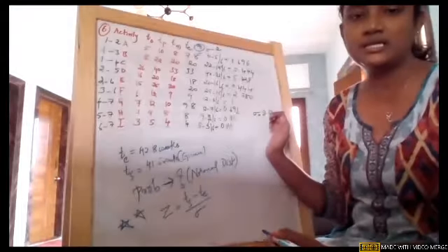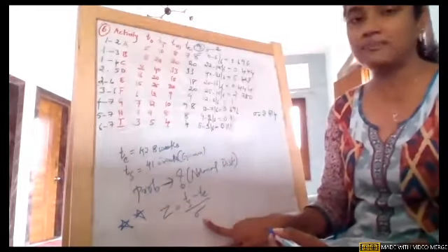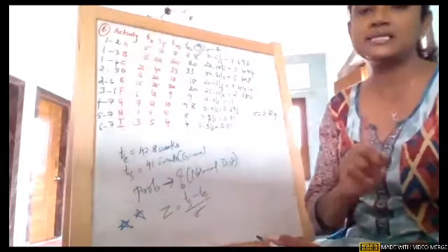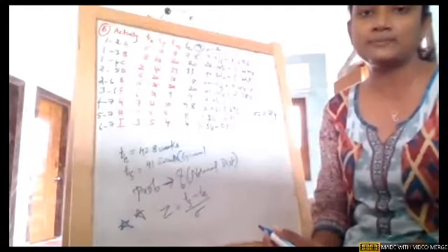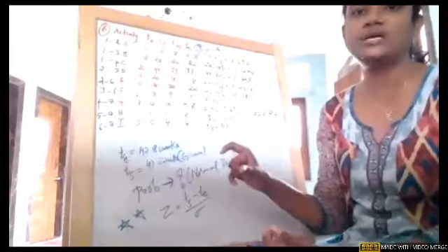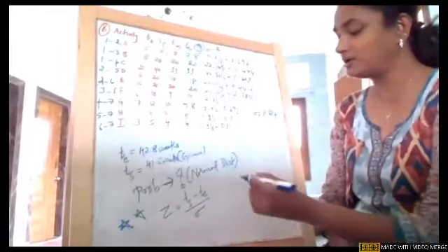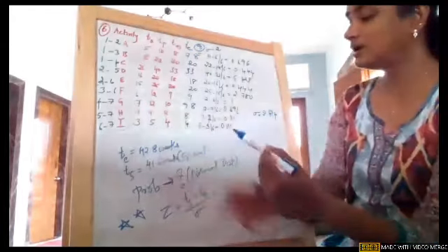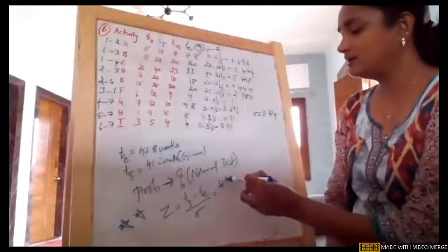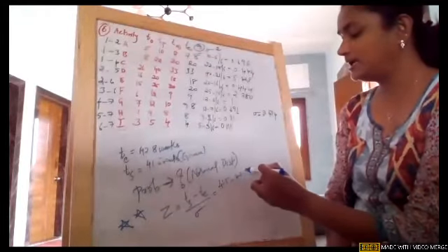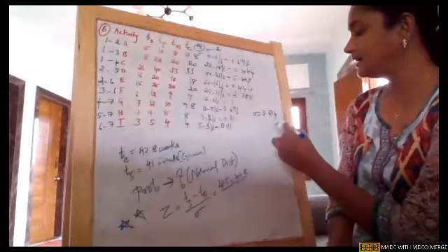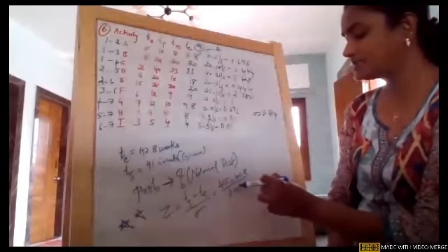Every time in the normal distribution, that sigma is nothing but the standard deviation of the critical path. Add all the variances of each activity and take the square root, and you get sigma. The same way we did. So it is 41.5 minus 42.8 divided by sigma, which is 2.474.